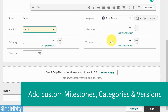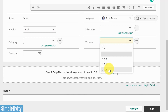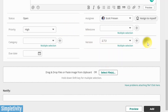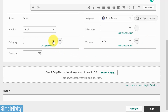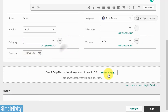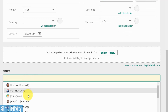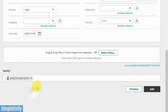I can quickly and easily assign it to myself without having to go find myself in the dropdown menu. I can select from a variety of different priorities. But these two fields in particular — milestone and version — I think are most helpful, and you can customize these selections. If I'm part of a development team, maybe I want to track the different versions this task is assigned to, and I'll say 2.7.3. I can quickly add more versions or milestones. I can also add customized categories, slap on a due date, and attach a file. And this last one is very helpful: I can notify someone else on my team without assigning them to the task — just letting them know what's happening as I create this issue.